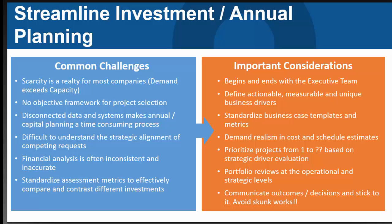Then the bottom third, you'd say, why would we ever do these? And there may be one or two that are in there because there's some wrong information, but do that sanity check. And then the middle third of the projects, it becomes really how much capital do I have to spend and what kind of resources do I have in the organization to execute them.